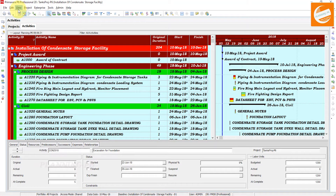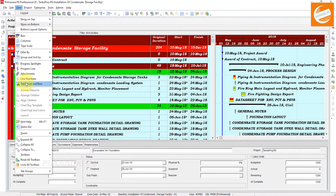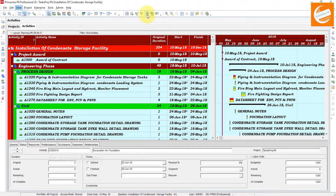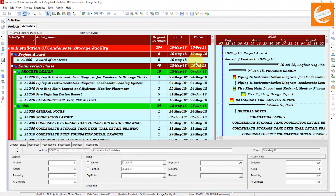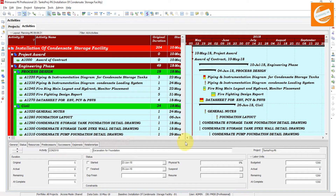Open your Primavera P6 and open your project schedule. There are two places you can see the progress line option — from the View menu and from the top toolbar. This is also a progress line option. One important thing: you must assign your baseline. If you have an updated project, the progress line basically shows whether your activity is behind or ahead of the baseline.